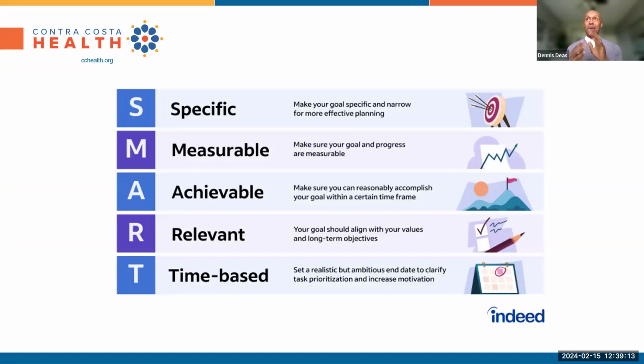So my example is, remember how Roberto said it's really clear. You need to know where you're at today, where you want to go, by when, and who it's going to impact. In this particular case, it's going to impact you. So my aim statement for today is, I currently can do 50 push-ups in a minute as of February the 15th. My goal or my aim is to get to 60 push-ups in 1 minute by March 31st, 2024. So I can do 50 now. My goal is to get to 60 by March 31st, and that's my aim statement.